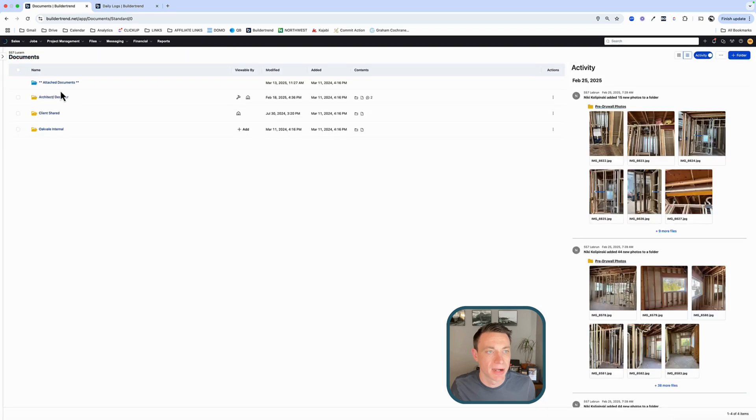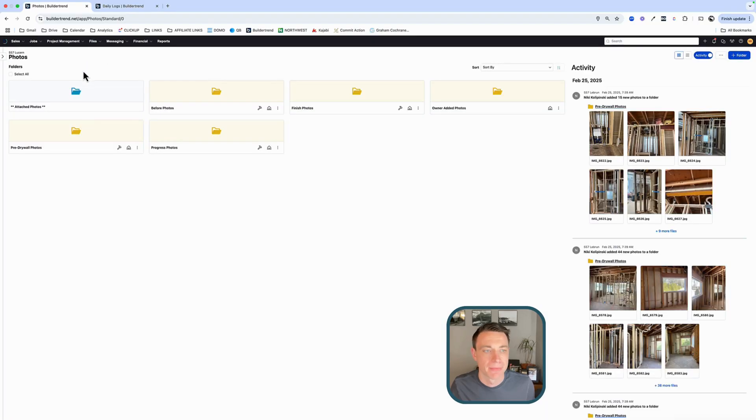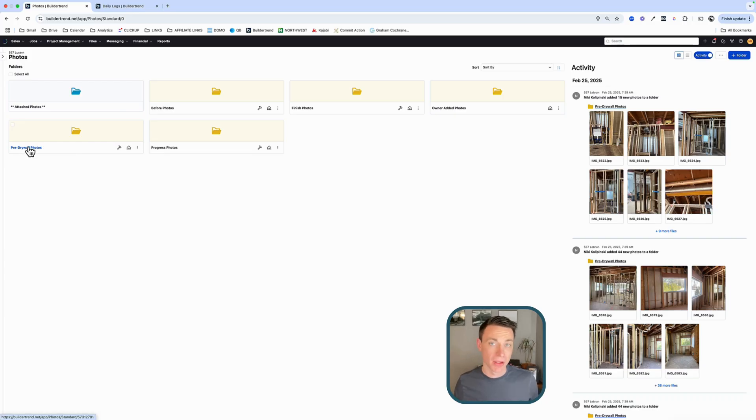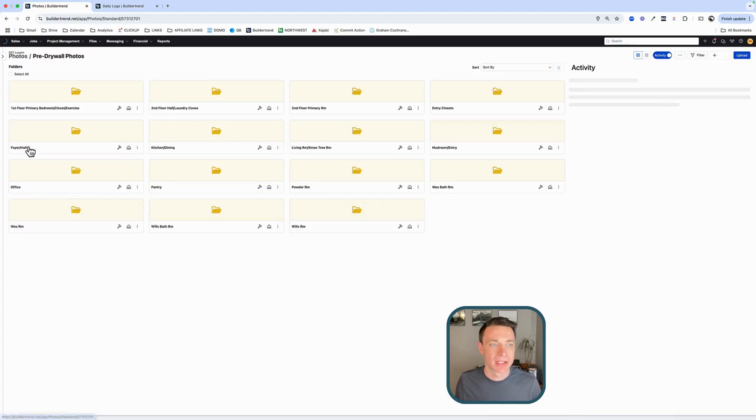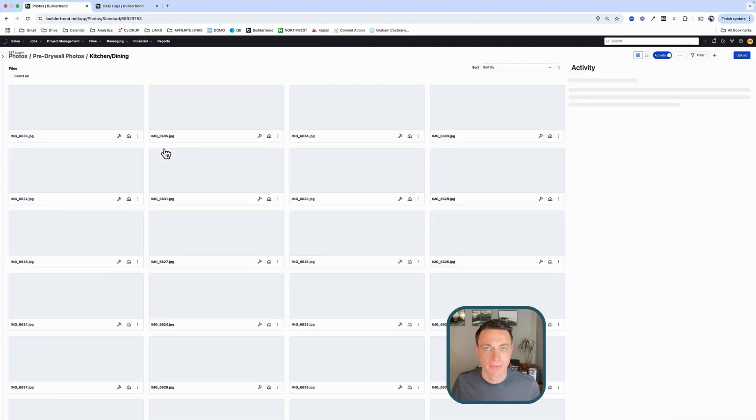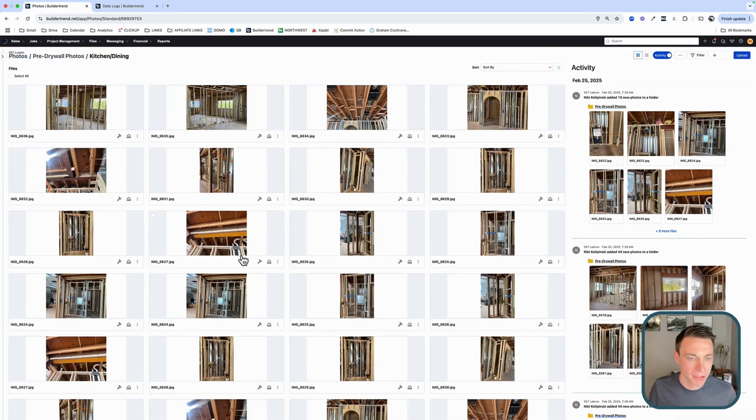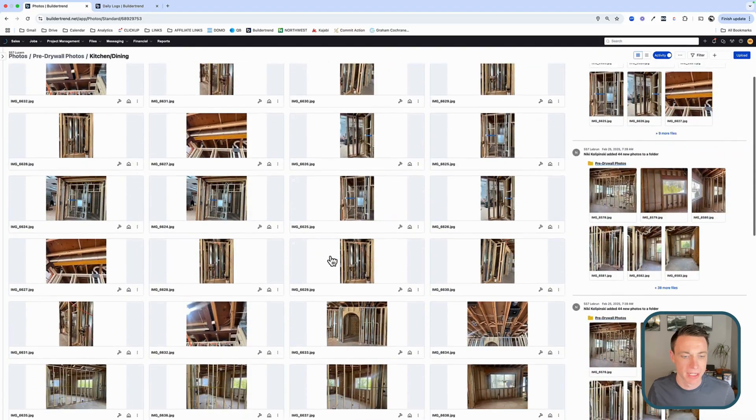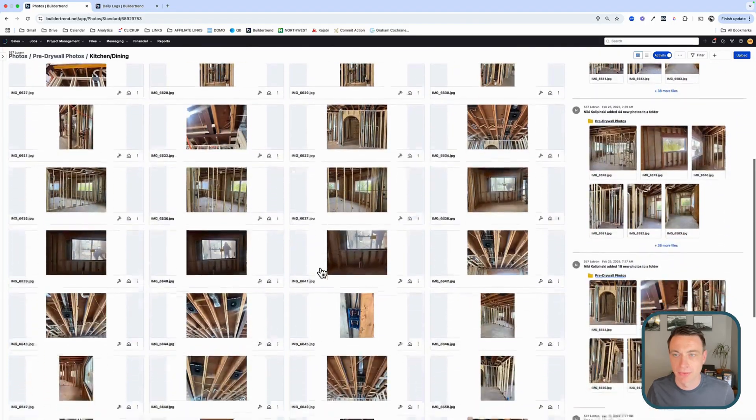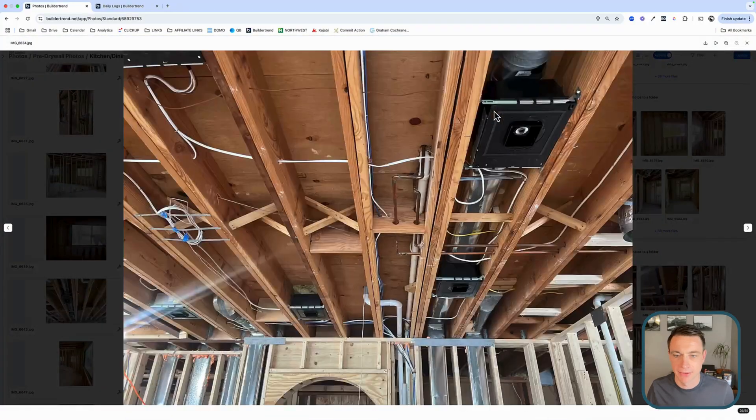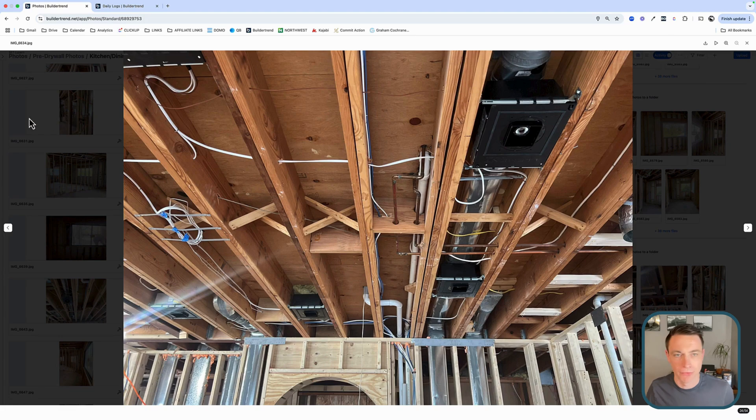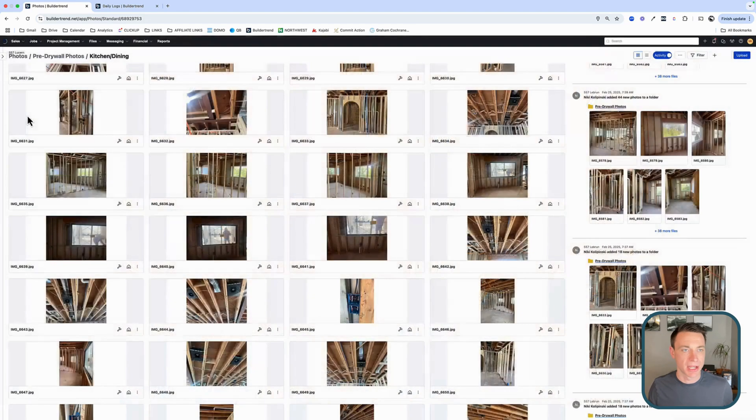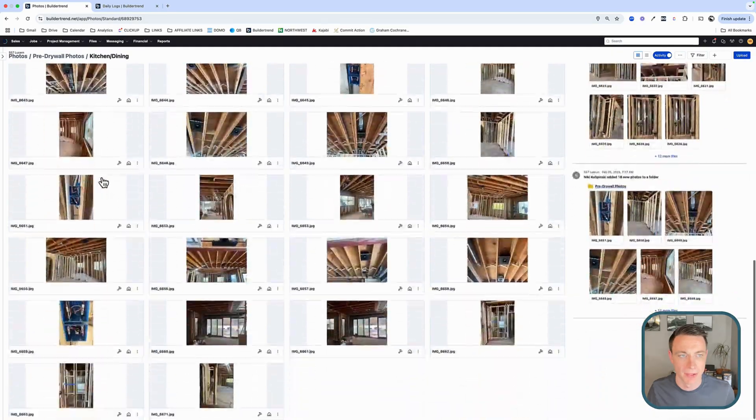Having a really strong document management system is awesome. We've set it up. We got architect designer, we've got the different bathrooms, different rooms, whatever that is. One thing that we do too, is on our photos, which is kind of documents, but it's a little bit different. We've got our pre-drywall photos. We've established a process through which we're standing there pre-drywall with a tape measure to establish where everything is. So we look at the kitchen, for example, and we have our pre-drywall pictures before we hung drywall in the kitchen. We got all of our rough-ins. We can see everything that we need to see. It's a really cool process that we have. And we've established that folder hierarchy. So photos are pretty much a subset of documents. So I definitely would recommend setting that up as well.